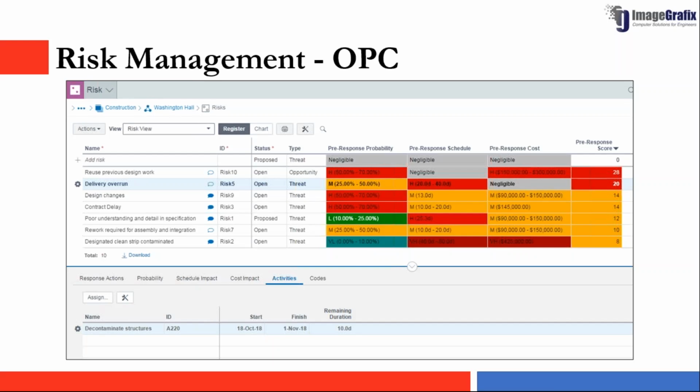Not only the risk registry, which is this one, as you are seeing here on the screen. So this is the risk registry. Normally in risk management, you have risk identification, then registering your risk, doing your risk analysis, then taking the risk response actions, right? And noting down the response action. When this risk occurs, you will be applying these response plans, whatever you have designed.